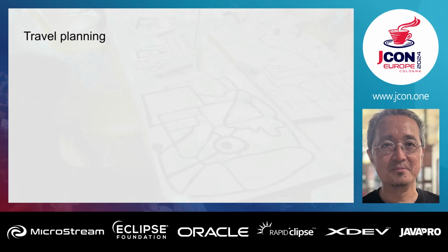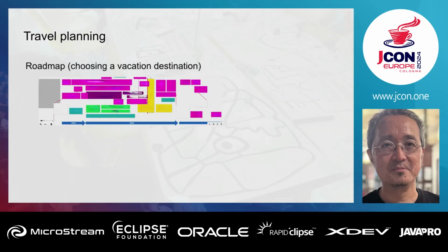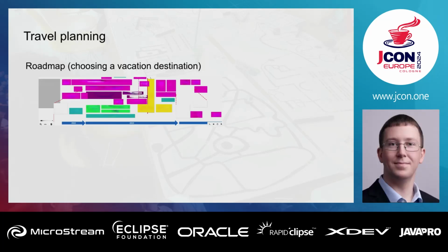Yes. So this is what we did, defining a roadmap. Just as an overview, so everyone knows what the main steps are. That we start with migrating the databases, continue with the applications in a specific manner, and last but not least, reconfigure networks, and that it takes months to proceed. And it's nothing that can be done in a sprint or so. And each and every team that is somehow influenced by the migration knows what to do and where are the points where they need to help us and where we need to talk to them and where we have specific demands.